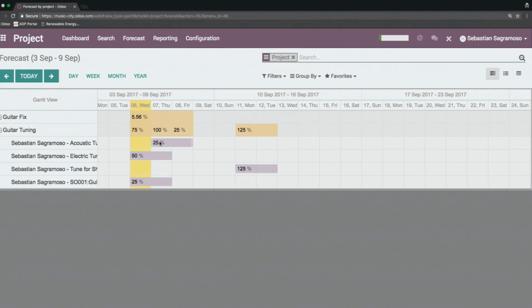But if I need to, I can see from the top here that for this day I'm at 100% working capacity. Over here I'm only at 75% and 50%, excuse me. And now I can play around with this, put this together. Now I'm going to be more efficient by putting these three together. I'm now at 100% working capacity for these three, and I can get those done sooner. Let's move it over here as well. And because I didn't have that assigned, I didn't have the right access rights, I wasn't able to move it. This is going to be a tool for managers primarily.